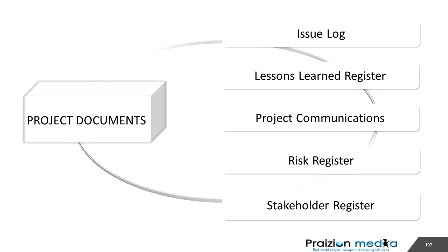We may also, in the risk register, be able to identify risks that allude to a stakeholder being disengaged. Your risk register could show when an objective is at risk because a stakeholder is not engaged to give you the needed support. So always think, why is this an input?